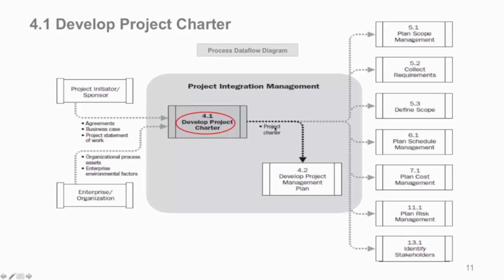You also bring in the charter and refer to it as you develop your schedule, because your project charter will have things in it like major milestones that are set at the beginning. Your business will say, we need these 3 deliverables by these dates. Okay, make it so, Captain Picard. So that comes in to refer to those major milestones. Now they may change as you actually develop your plan and reality kicks in, but at least you have a guiding marker in the sand of what you're trying to achieve.